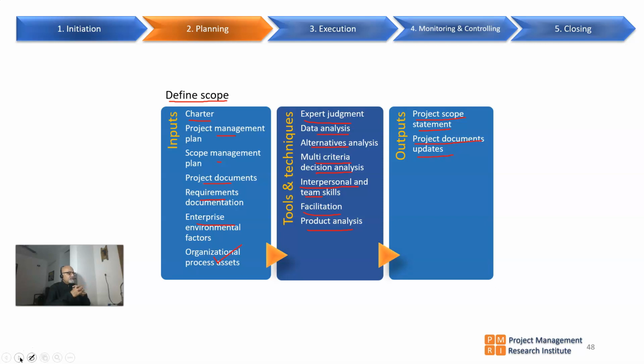For construction projects, this always happens prior to signing the contract. That is the common practice. Whereas in IT projects, generally the detailed requirements collection and scope definition happen after signing the contract.